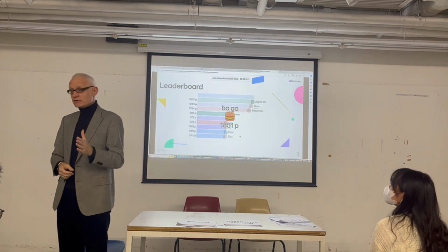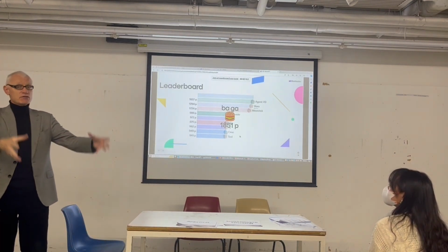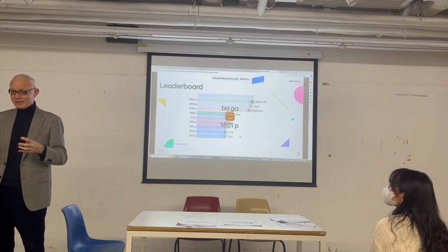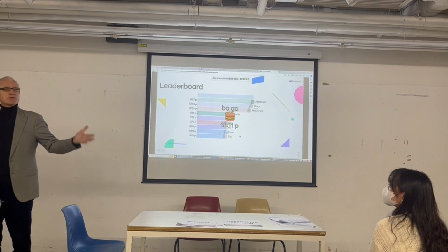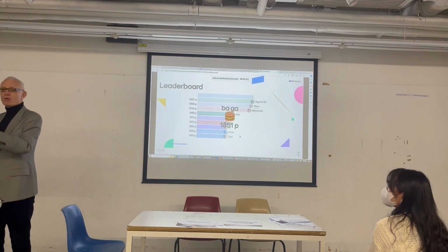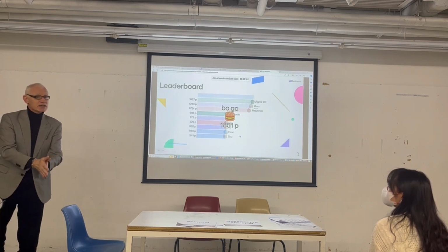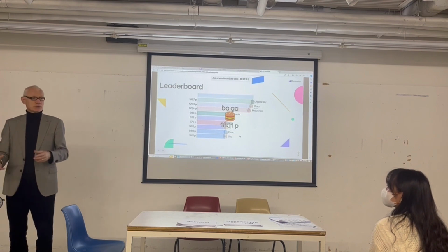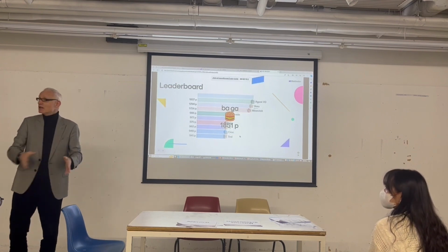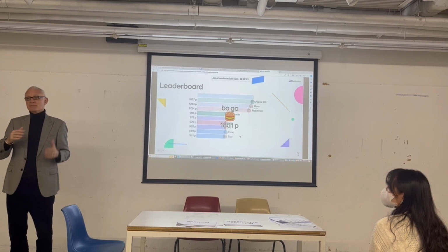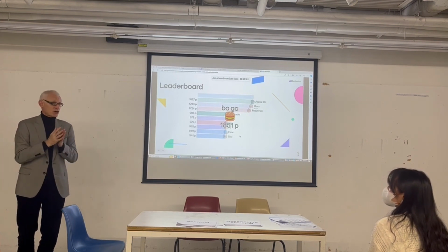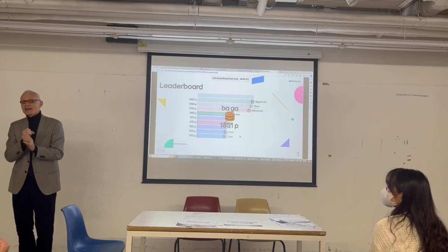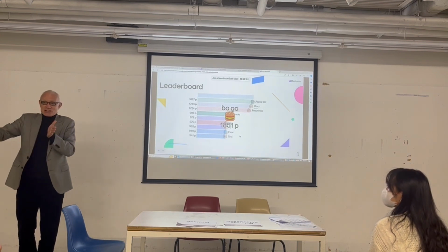Your client has agreed to take over their property or move in on the date in the contract, right? So if it's a business, maybe they've got to move their whole business, maybe they're terminating leases, all sorts of arrangements. So even for you, it's not easy. Changing dates and times is really a bad thing. So we'll always be looking in the contract to avoid not only extra cost, but extension of time.